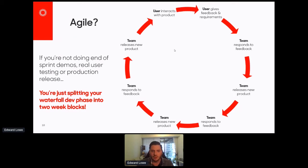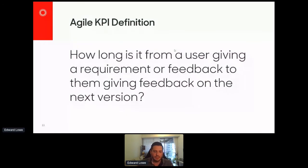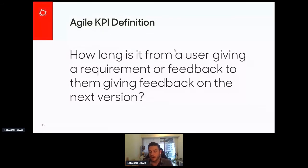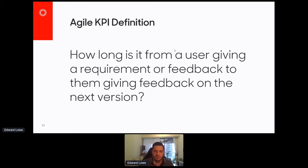So what you've really ended up doing is breaking up the waterfall dev phase into two-week blocks, and that's what prevents visibility. My internal KPI definition for Agile is not how long each individual sprint is — it's how long it is from a user giving a requirement or some feedback to them being able to give feedback on the next version. If that's one sprint, perfect. But if it's three or four sprints or even longer, that is the actual length of your loop.